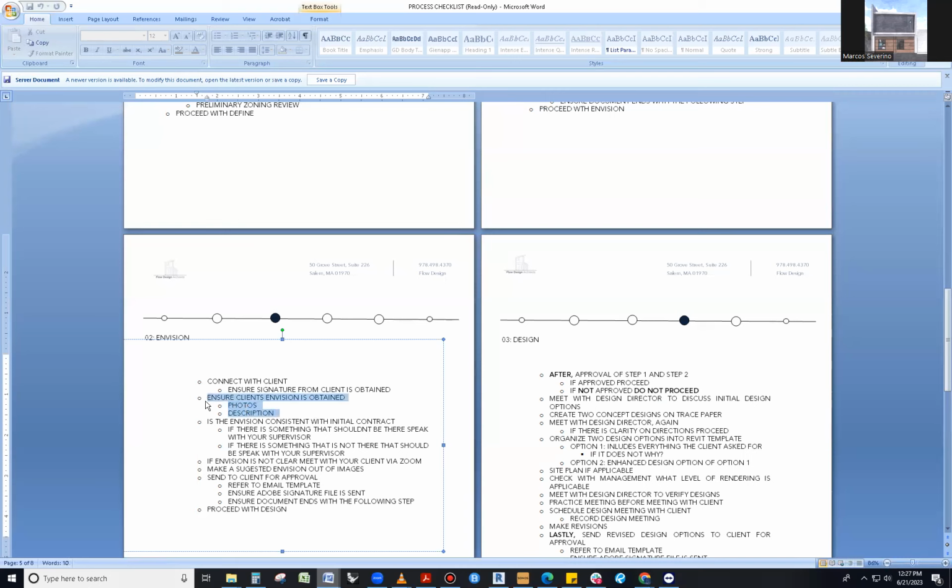If they're not obtained, send an email saying, hey, you've not provided this, I'm going to waive that. You're gonna waive the rights to any changes if you don't provide this. Literally, there's not an email for that, but it's basically saying you skipped it. Therefore, if later on what you got is not what you wanted, you pay extra for it because you didn't give it to me. Okay? So there must be a way in writing to say that.